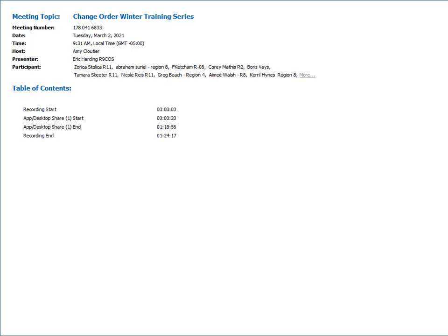And I'll use that as a shameless plug to the OEs. You should be spot checking certified payroll against inspectors' DWRs. It's the inspector's responsibility to say who was on site, and if they were not on site for the entire workday, what hours they were on site. And those spot checks need to be made when reviewing certified payroll. You don't just look at payroll and say, yep, prevailing wage, OSHA cards are there, EBO's been filled out, we're good. You have to spot check that those payrolls are accurately reflecting what we have recorded for labor on the project.